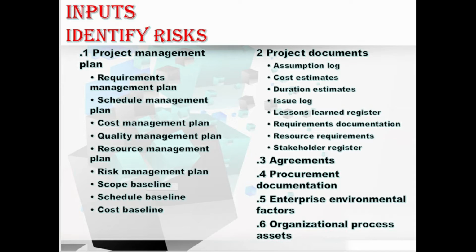In this, the schedule baseline may be reviewed to identify the milestones and deliverable due dates that are subjected to uncertainty or ambiguity, and also where the key assumptions have been made that might give rise to risk. Hope you understood the schedule baseline.